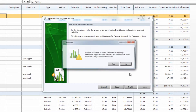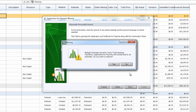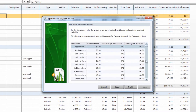If you continue you'll see that you do have the option to access some materials presently stored. We're getting a pop-up letting us know that multiple estimates have been found for this job and asking if we want to continue. In this case we absolutely do — that's just indicating that we have both the main estimate sent over from Construction Suite and the change order estimate created after that was accepted. So in order to get both of those estimates contributing to the total, we need both estimates and we would like to continue. If you have any materials stored and would like to apply retainage on those materials or have a value for them you're charging your client, you can put that in here, but otherwise you can continue without any changes.